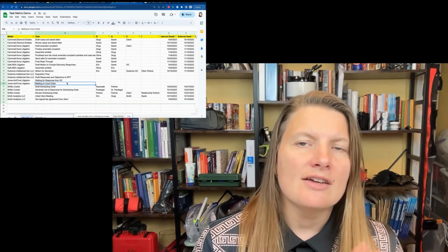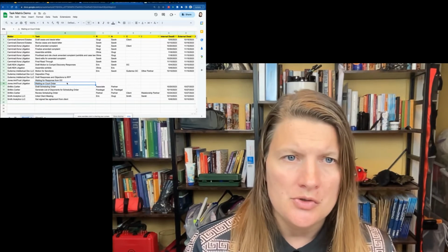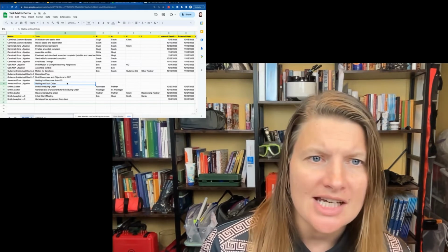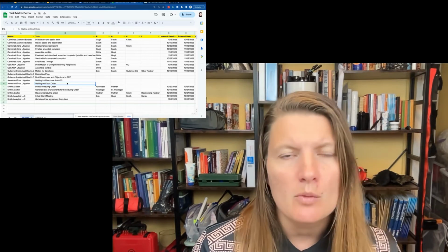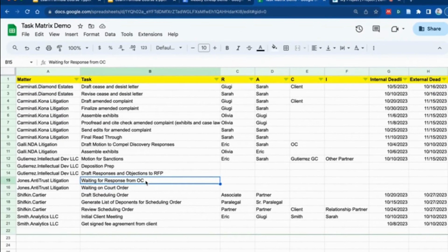If you see, the ones that I've covered with you so far are pretty active. We know what people are doing. You're finalizing the amended complaint, you're assembling exhibits, you're proofreading and site checking, you're doing a final read through. Okay, we understand what that means. Look at this. Waiting for response from OC, from opposing counsel. That's not a task. And unfortunately, you're going to see it show up. And in fact, people are going to report that as a task. That's something that they're doing. That's not doing anything. Waiting for a response from OC is not doing anything.